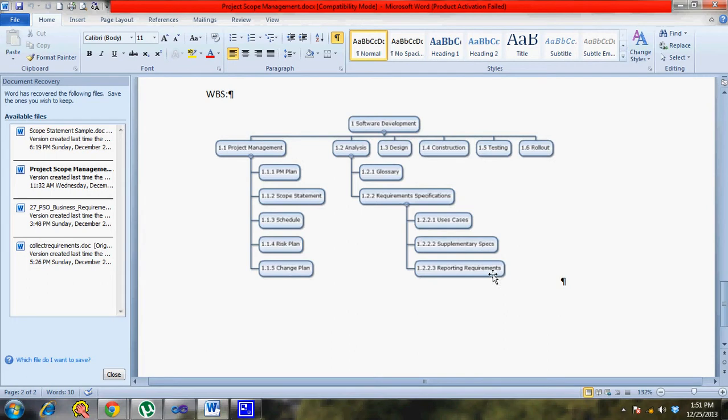If you are doing something in the next one or two weeks, you would have a better broken down structure for that work period. As you go down into a specific phase, you get a better idea and you break it down in a better way. That's where the progressive elaboration concept also comes into the picture.